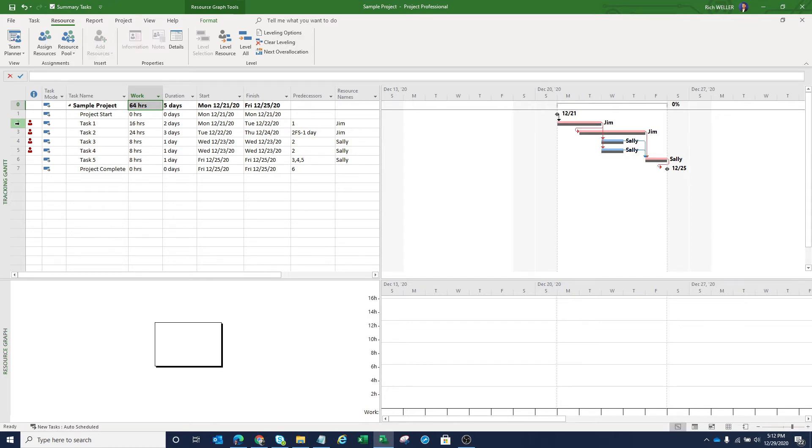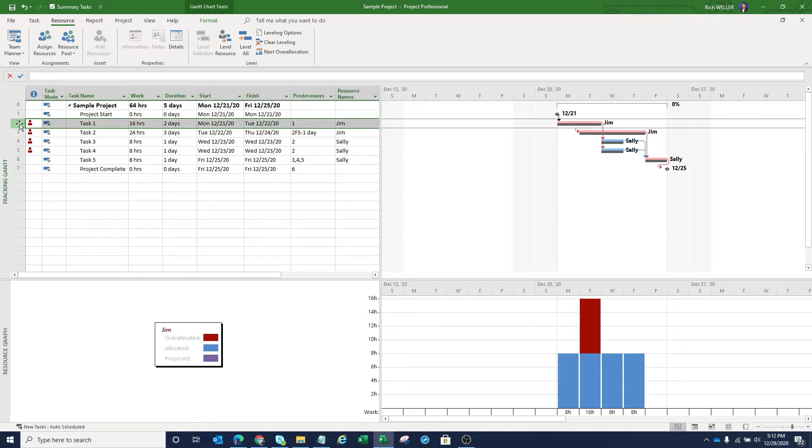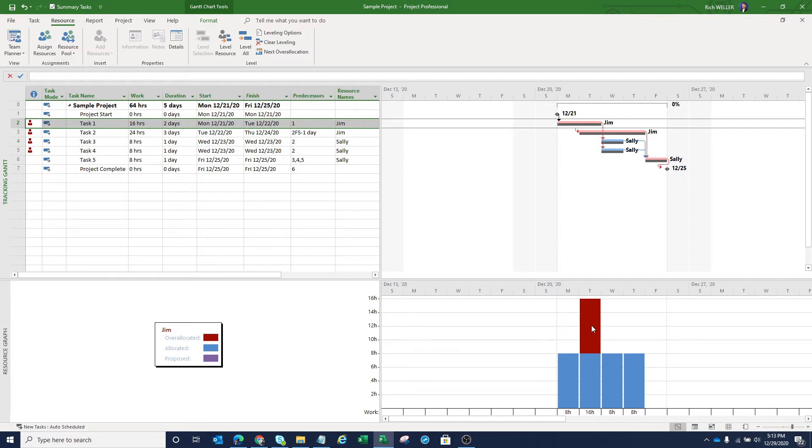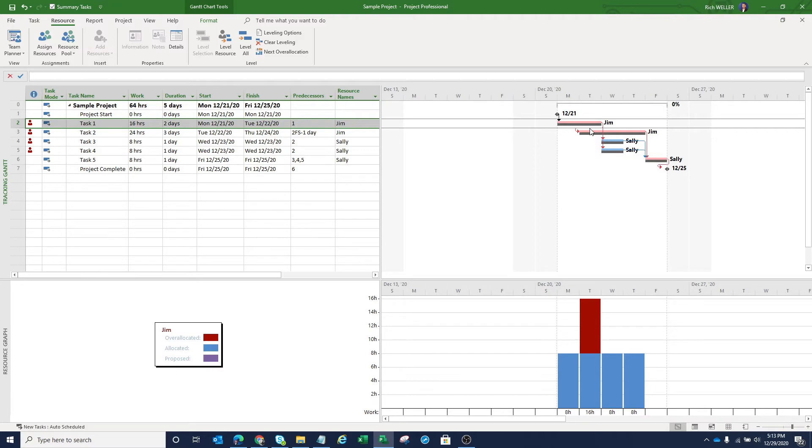As soon as I click on task number two, you can see that the resource graph is now displaying for Jim. And as we look at the graph on the right, we can see that Jim is over allocated on Tuesday. This would be December the 22nd. And we can see that over allocation here appearing in red. The reason why Jim is being over allocated is because we're asking him to complete 16 hours worth of work on this day because these two tasks are currently overlapping.